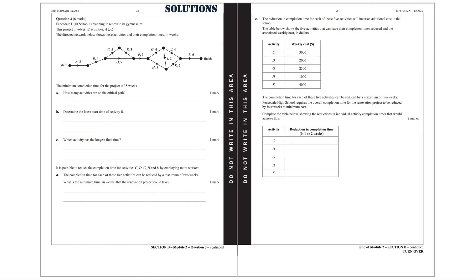Question 3. Fensdale High School is planning to renovate its gymnasium. This project involves 12 activities, A to L. The directed network below shows these activities and their completion times in weeks. The minimum completion time for the project is 35 weeks. Part A: how many activities are on the critical path?